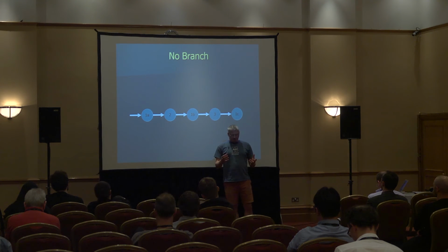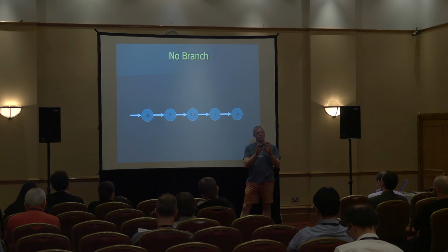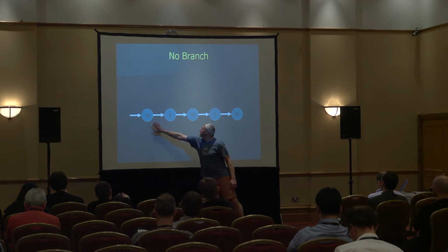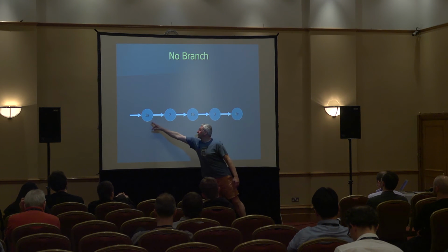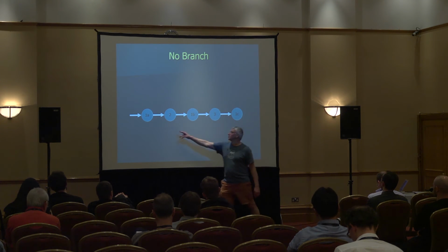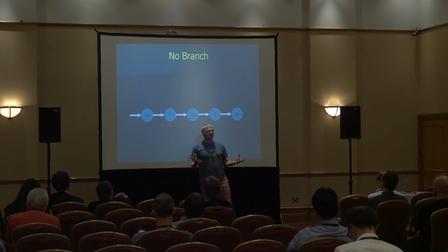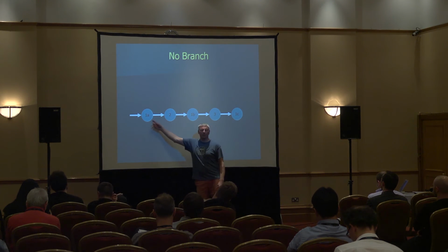The other way to deal with it, though, was to think about breaking the work down into smaller units of work so that we could deliver a little bit more bits of functionality in a more incremental fashion, which hopefully is what this conveyed. We've got 1A, effectively feature 1, split across a number of commits. So there's a little bit here, and a little bit here, and a little bit here. So this, for instance, might be a refactoring, because by definition, a refactoring has no observable change. There's no reason why I can't do it here. Go into production, no problem.